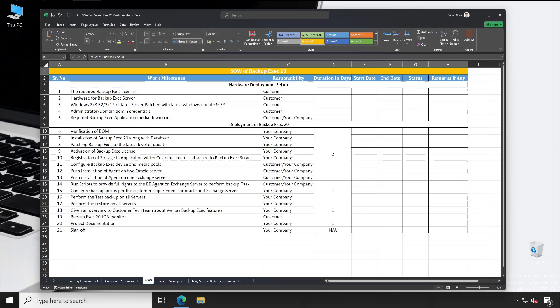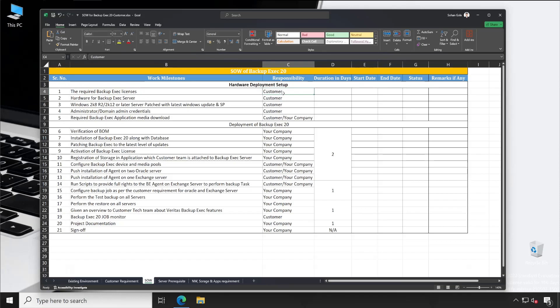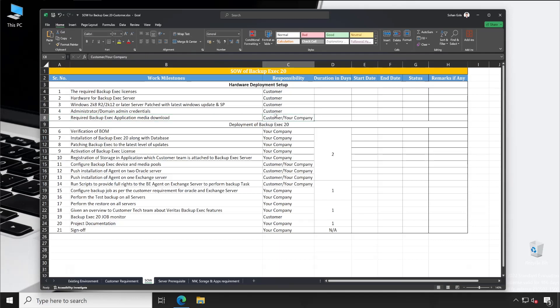Once all the information is gathered, you can prepare your plan of action as well as scope of work — how exactly you're going to proceed with the implementation. For example, the required Backup Exec license needs to be arranged by the customer, as they are the ones paying and should follow up with the partner or your company. Then the hardware for Backup Exec: what standalone server you propose, what RAM, hard disk, CPU, and operating system are required — all these are prepared by the customer along with an administrator account.